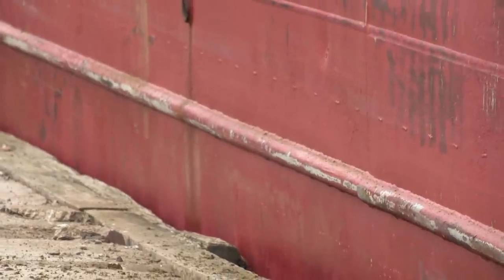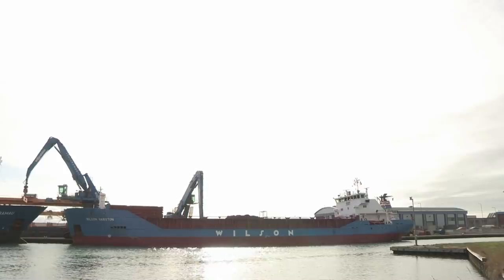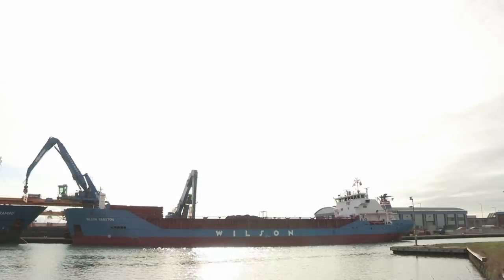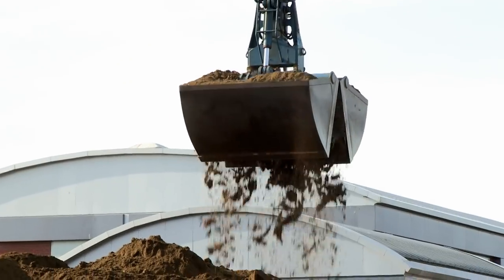Despite the increased risk, time is pressing. We're looking like we can get dark in the next hour or so, and we have a pilot booked for about 4 hours' time, where the ship's got to be taken up the harbour, spun round and taken out. If we miss that tide, it won't sail for another 12 hours. We're definitely up against it a bit more now.